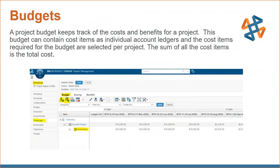Resource pools are a great tool — if you go into project management, definitely look into utilizing them. For budgets, you set them up when you create the project — by week, month, or quarter. Once set up and finalized, you freeze the budget so it can't be changed. After that, you track actual consumption against it — entering what was used, when, and how much — and that data flows into your analytics.